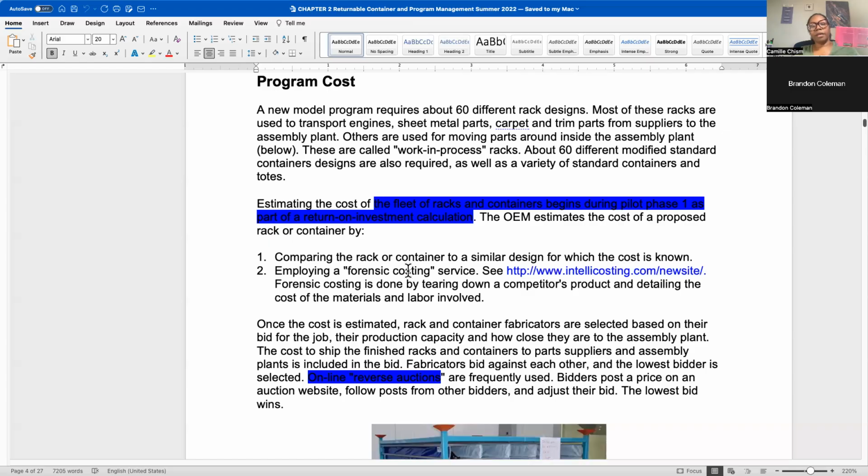Now, after the pandemic, with the shortages, supply chain backups, and issues with oil reserves and resins and all those sorts of things, this may now cost $175. So you can keep that in mind with your estimate, but you can take the similar design for something. Even if you have a windshield, let's say, this windshield won't be exactly the same as the last truck, but it's going to be very similar.